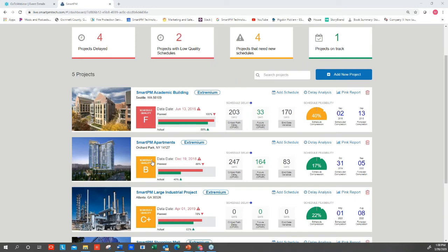No, this is about, does the schedule have a level of integrity built in and structured well to effectively manage a project like this? So we're talking about enough logic, following best practices like not having too many constraints, not having too many start-to-start or finish-to-finish, not having too many high duration activities. We call this the DCMA methodology for schedule quality.